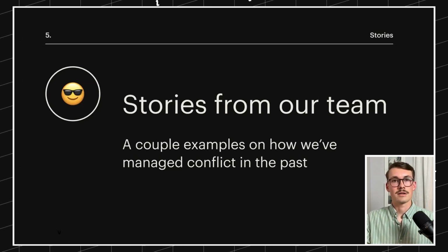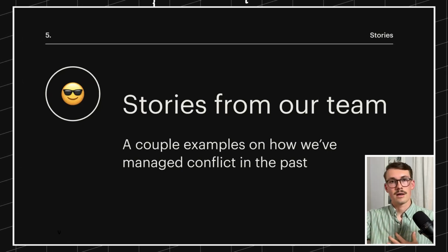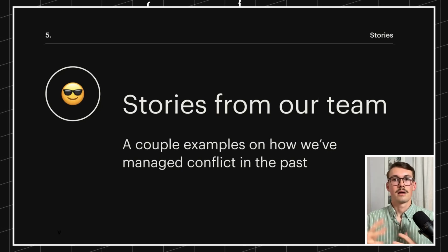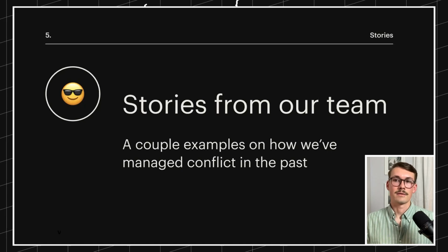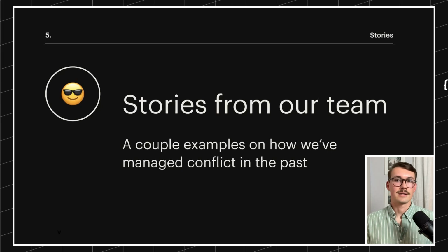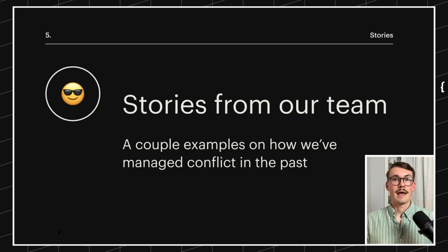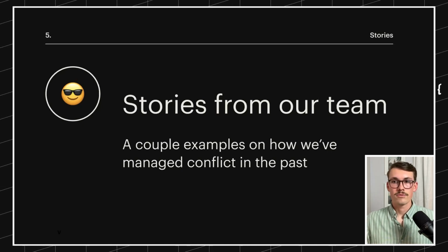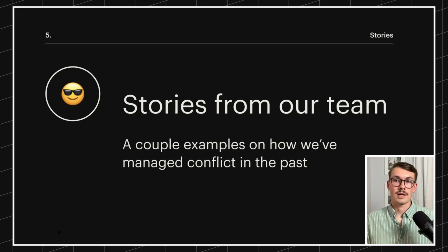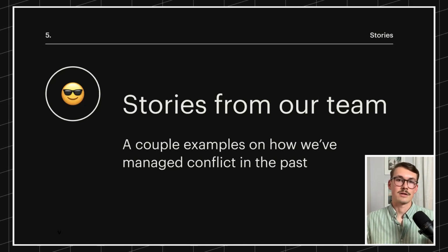Okay, maybe there was some miscommunication. It wasn't just us, it was also you guys. No worries, we're not going to get into the details. Here's the fact of it, and what are we going to do about it? So since these are out of scope, we will have to send an additional invoice. And guess what? The client agreed to move forward. They agreed to the additional invoice, and they launched with those additional 38 pages on time, and they were super happy that we managed to build everything.